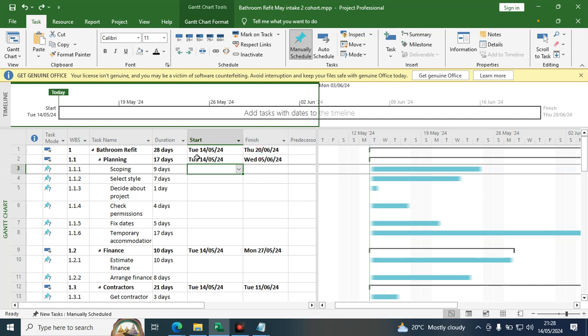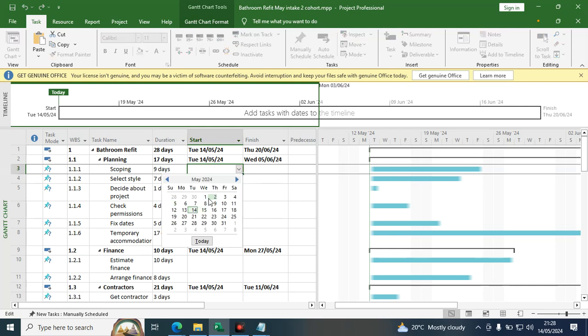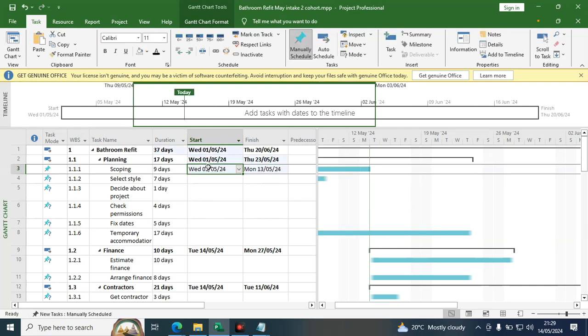We said we have 3 types of calendar. That is the night shift, 24 hours, and the standard calendar. So we are going to work now on the standard calendar to define the date on which this project is going to start. I'm assuming that the project started last week on Wednesday. That was a working day, and automatically the system picks the first activity.